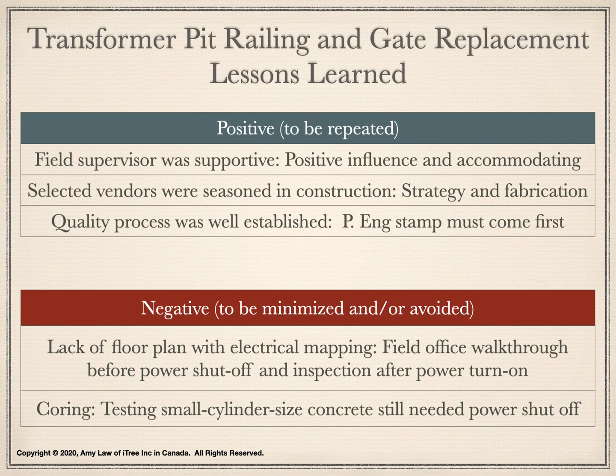Without the electric floor plan, we had to turn off the power supply of the entire building before drilling. This was an overhead, leading to additional effort, time, and budget. When we turned off the power, we must engage the utility for a pre-shut-off walkthrough and post-shut-off inspection. This was about $1,000 each run.